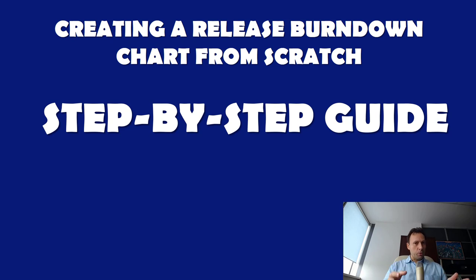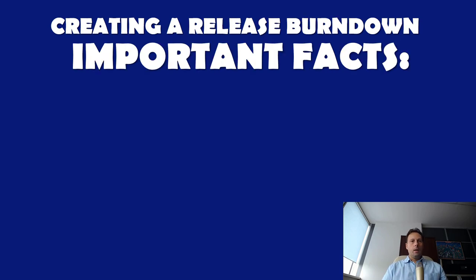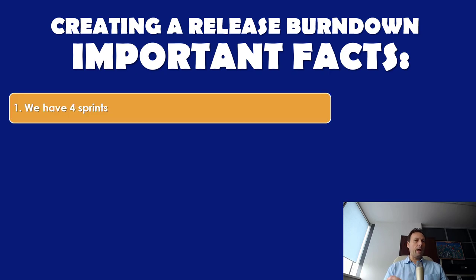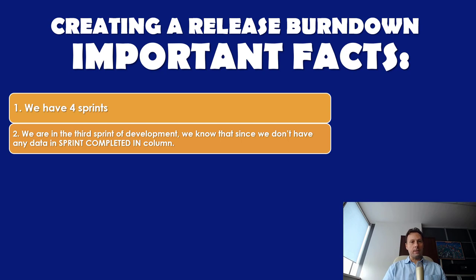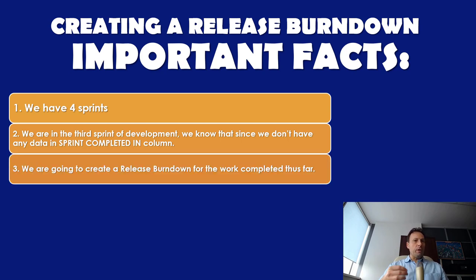Please go to the resource section and open the release plan information, which is a Microsoft Excel document, and see what is in there and what are the inputs. Here are the important facts for our assignment. We have four sprints. We are in the third sprint of our development, and we know that since we don't have any data in the sprint completed column, which I am going to show you in just a second. We are going to create a release burndown for the work completed thus far. This is very important.